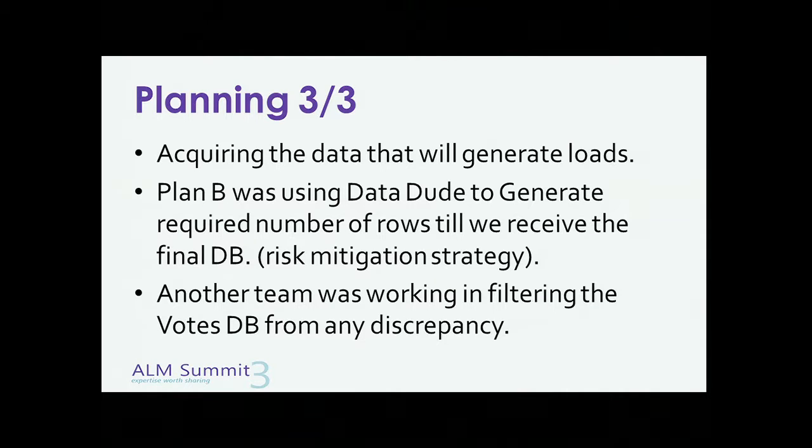And our testing database actually contained data about 55 million voters. And there was a separate team who was responsible for preparing this database. So we were at risk that maybe when we began our load test, this team that was appointed to prepare this original 55 million voters database would not have finished filtering these records. And this was one of the most important factors in the whole elections process, simply because any discrepancy that could be discovered inside the database may hit the credibility of the whole elections process.